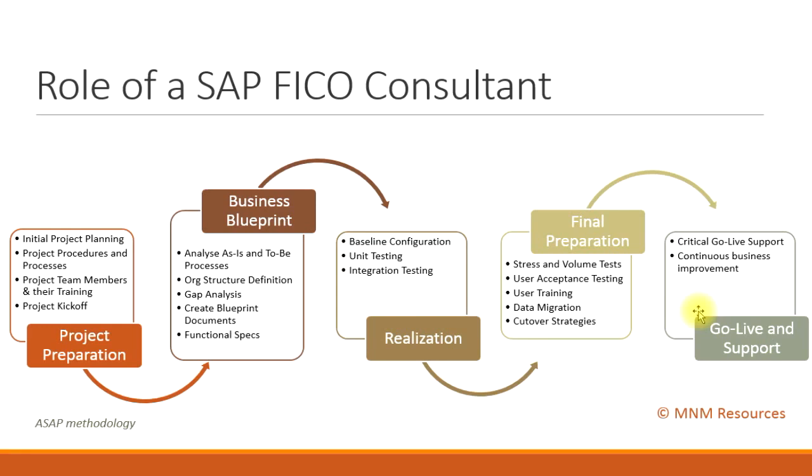This stage, you'll be defining these cutover strategies. So cutover strategy is defining at which date you want to go live, before the go live dates, how we are going to do the data migration, when you're going to do the transport settings, is all the configuration complete, is there any additional stuff needed, are you ready to go live, if there are any changes going to go live. So anything related to the critical go live stage is discussed during the cutover strategies.